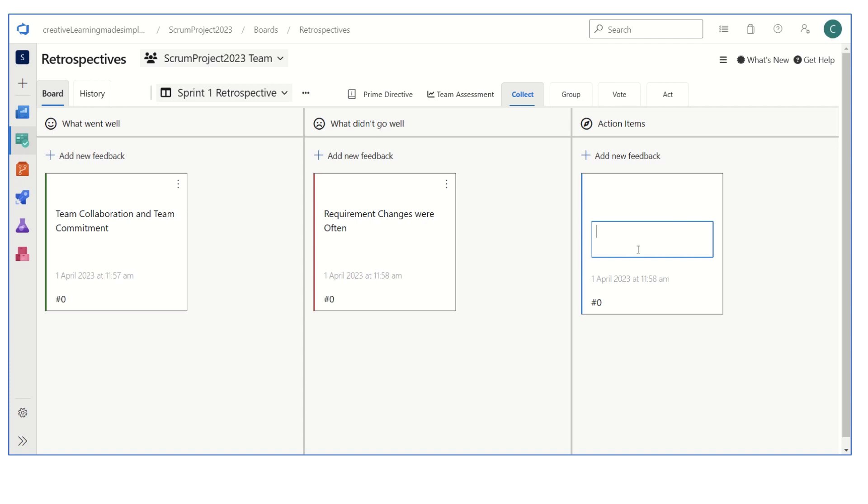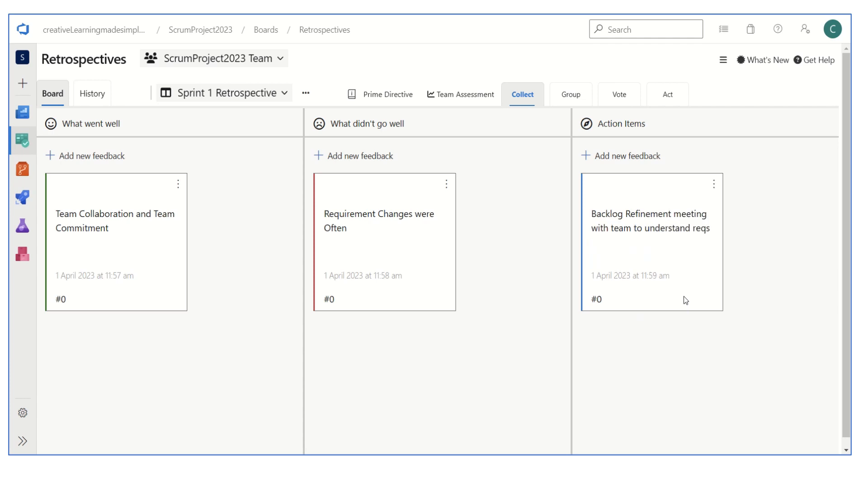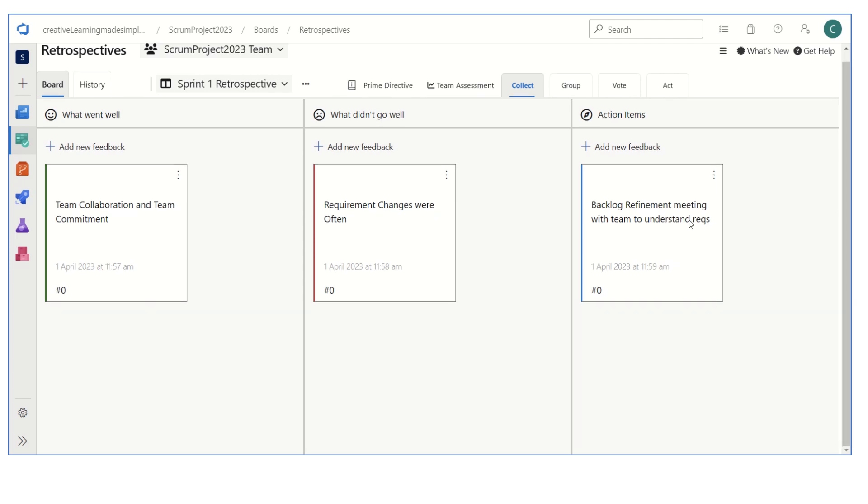Similarly, if the team decides what they can do regarding this particular improvement, they can say backlog refinement meeting with team to understand requirements. This is how the different cards can be placed by each of the sprint team members. They can place their cards on what went well, what didn't go well, and then on the items which need improvement, they can say what are the action items that the team can take. This also allows the team to vote.